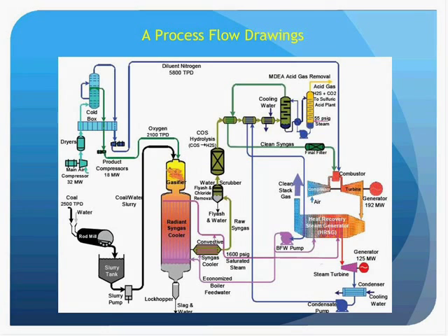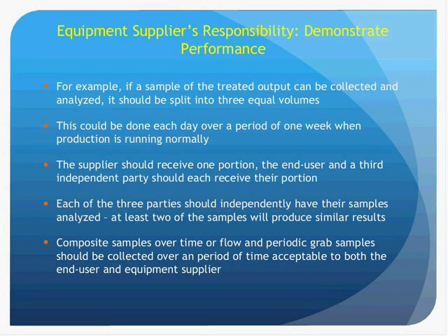How could an equipment supplier verify to the end user that the installed purification system meets what was guaranteed? The next slide provides one process. While this may sound simple, it is not. Please let me explain. The verification process should ideally be repeated at various times under various conditions. A convenient opportunity to verify performance can occur at the startup. Another opportunity, such as applicable to an industrial manufacturer, can occur at different times when manufacturing is producing different volumes of material to be purified.